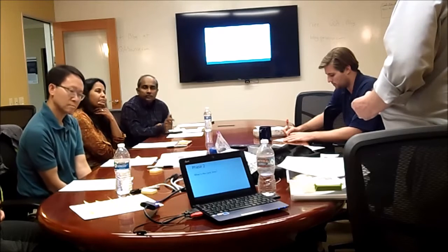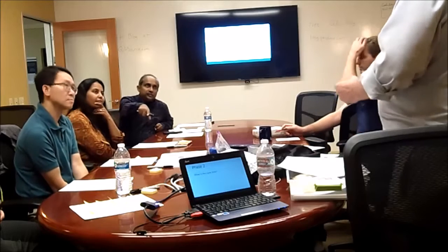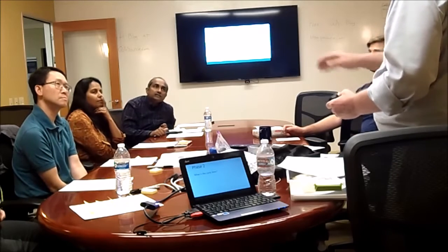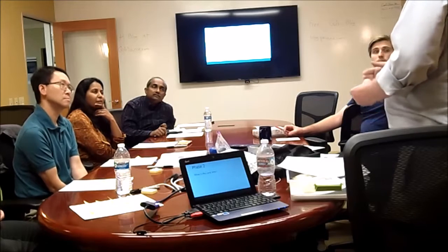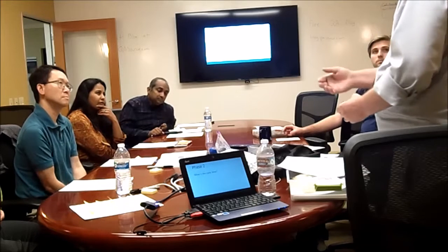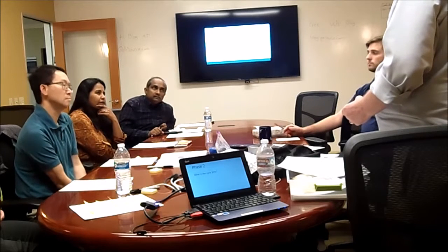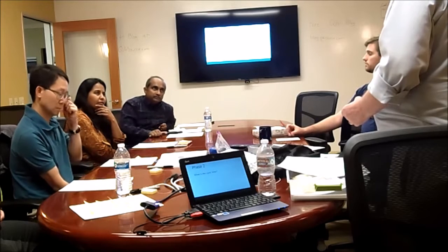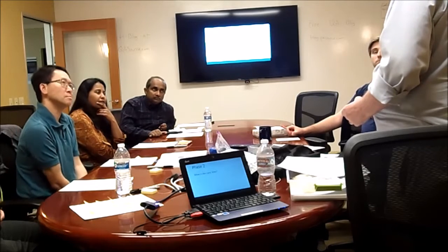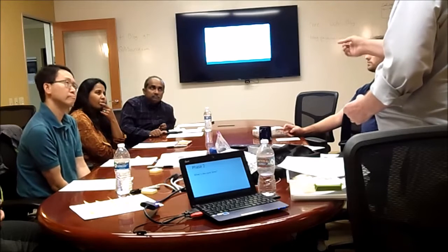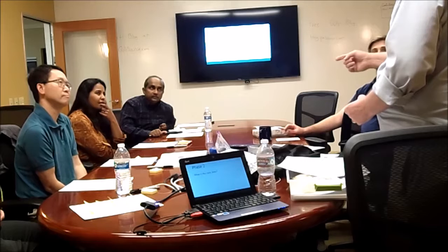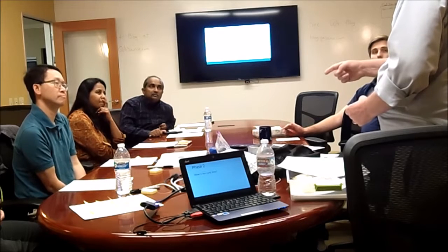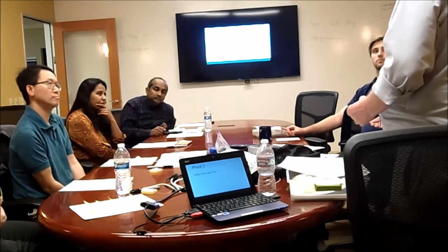It would still be growing, right? No, I'm talking about the first time we did it, when it was piling up. Yeah, okay. So if you keep running that, and things come into the system faster than they come out of the system, what happens? A lot of work in progress would pile up. And does the work all get done then? No. So you have orders that come in, or features that come in, that pile up, and they're not ever going to get done because of this imbalance, because people are working too fast. Correct. They're working ahead of the bottleneck, right?